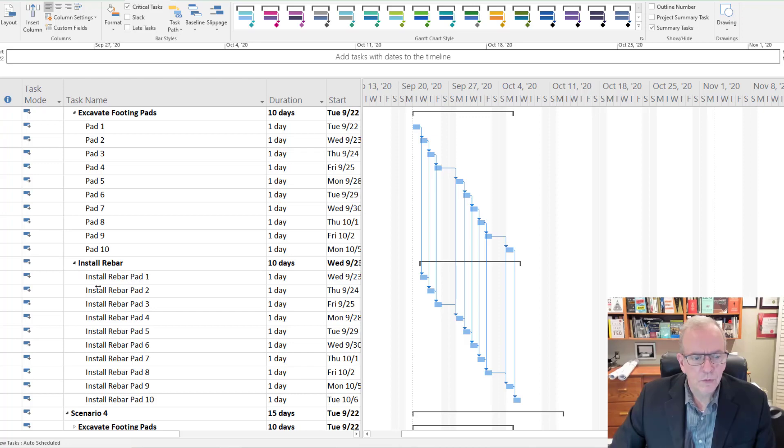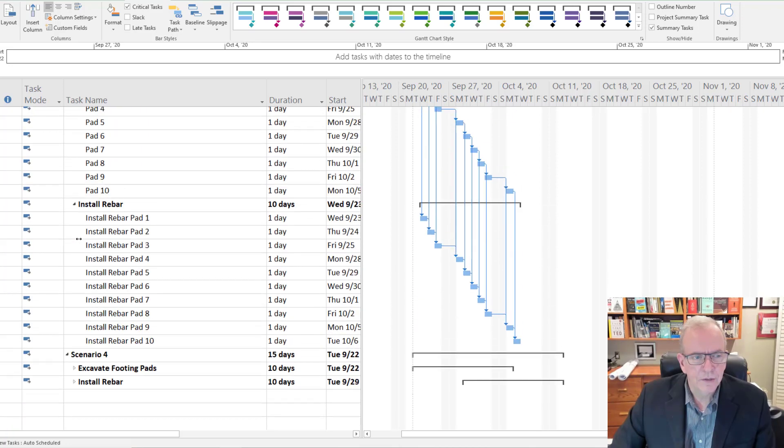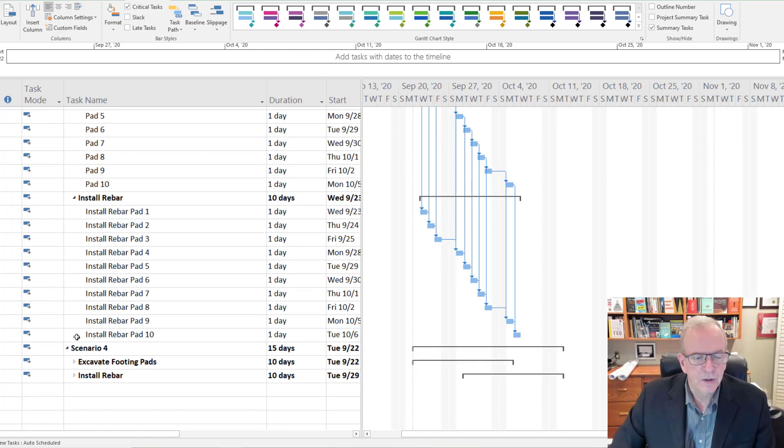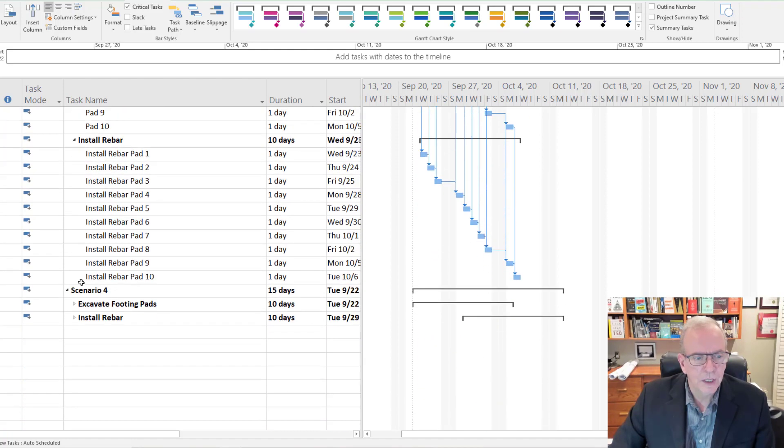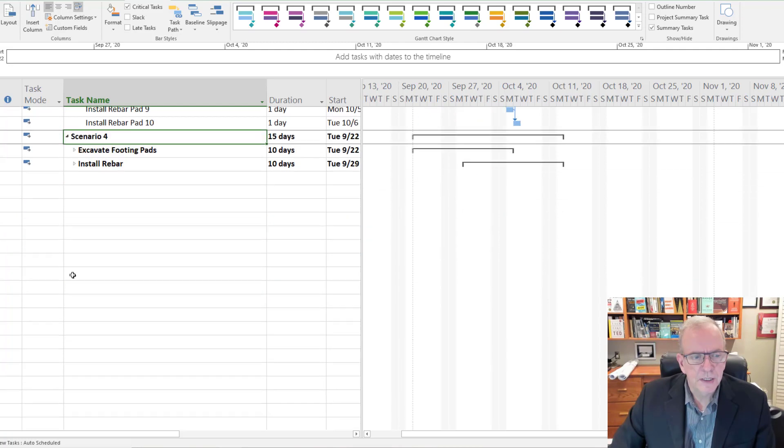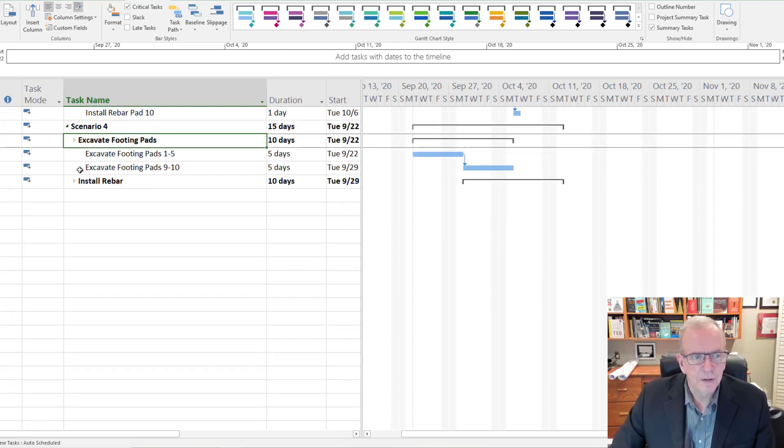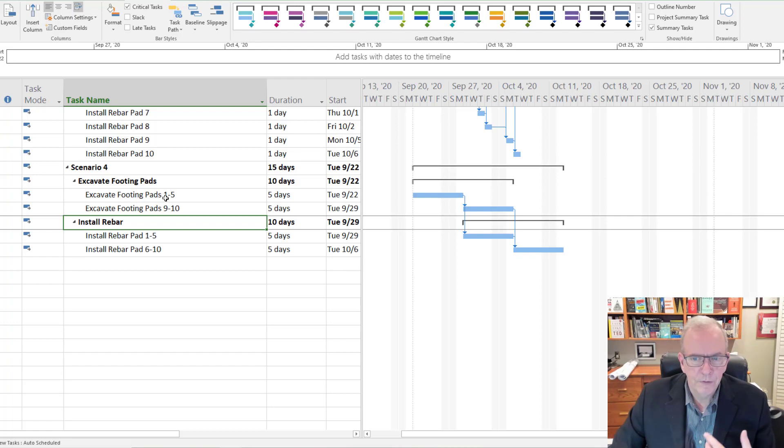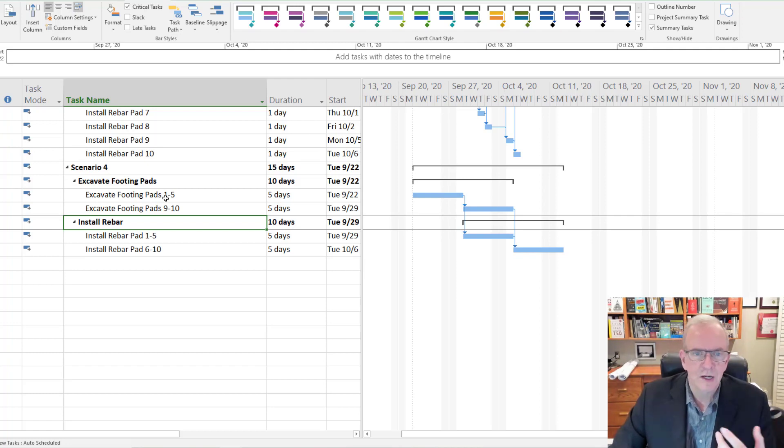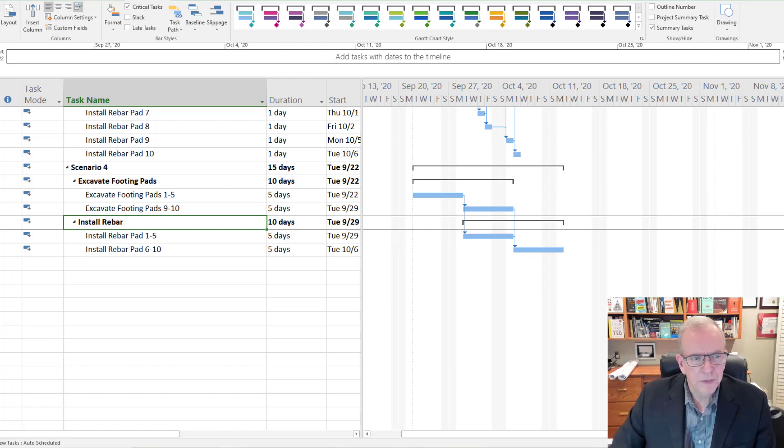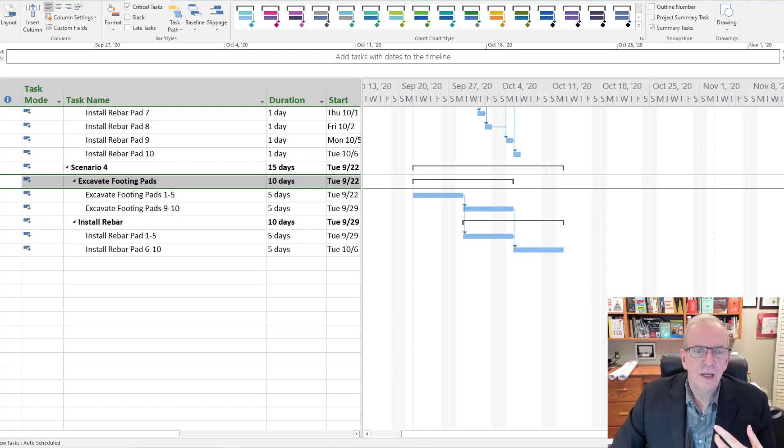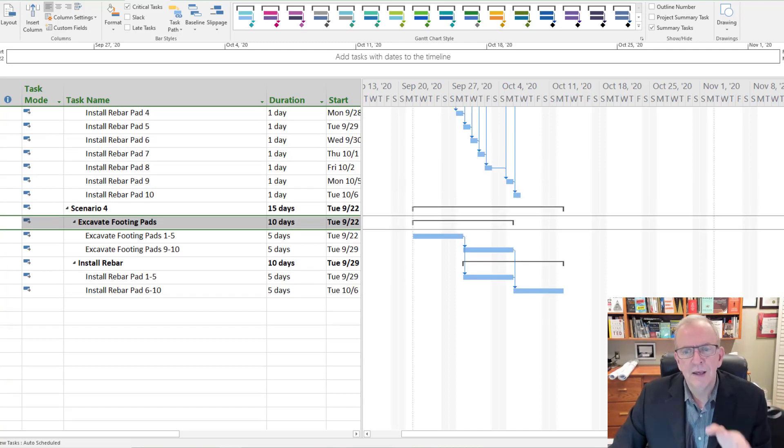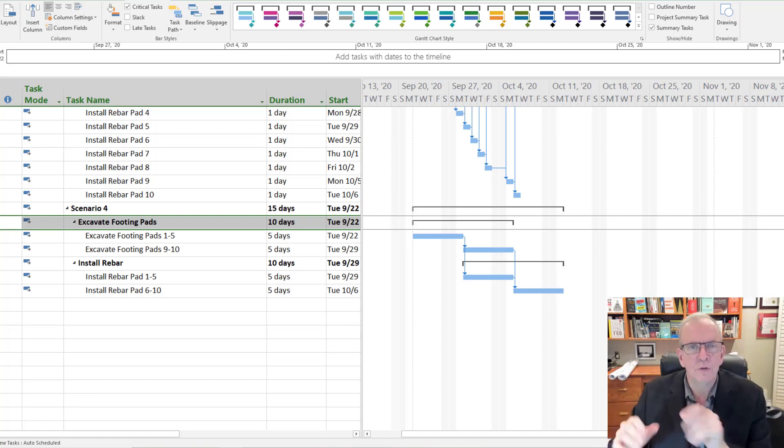If we go to a different scenario, scenario four. We've got five and we've got five. So this might make a lot of sense from a point of view, say it was pouring of concrete or something, the truck size. Sometimes there's underload costs, different things like that for delivery of concrete. So what is the optimum size for what we're doing and the optimum amount?